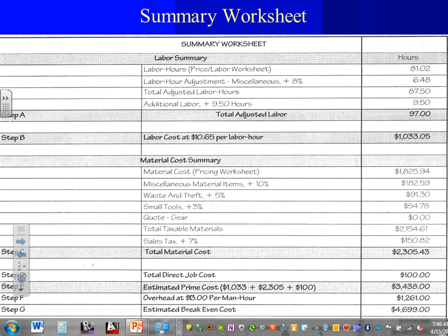We talked about that your hours are here, Adam. You adjust your hours based on the condition. Then you add the two together. That will get you this one, easy. Then you also add more labor for whatever reason that you have. So you add more labor based on adjustment. And that number will be your total man hours for this job, right? That's easy. That's your